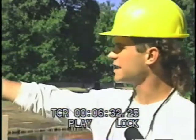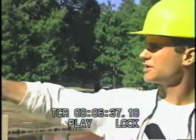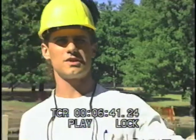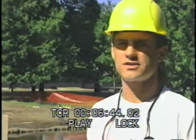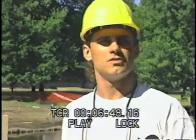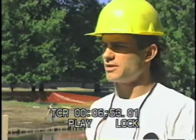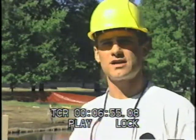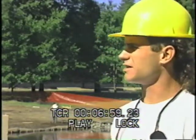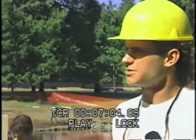So then people would have to get out in the road and cross this bridge, and they would generally cross the bridge going at a really long angle, so they're in the road for a long time. All the physical plant vehicles are driving back and forth, and the university recognized it as a real hazard. They figured one lawsuit would be an easy couple of $100,000. So they were able to give us, originally they were thinking $50,000 to do the whole thing. And the budget's increased probably about 1.5 times that, a little bit less than that.